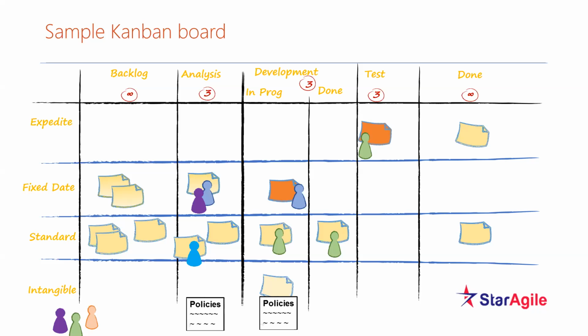Okay. But all the internal defects, you will not put in the expedite lane, that you will have to take care of internally. But let's say there is an urgent or critical defect, which will stall the entire system and entire work. It's like an escalation. You'll put that in the expedite lane. So you stop what you're working on and start working on that. Now, when there is something in the expedite lane, what you will generally do in your daily stand-up is check that there is an urgent issue. You'll stop current work, you'll discuss, and you'll move that forward.